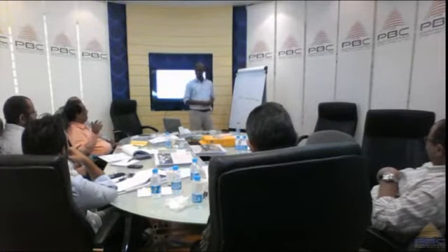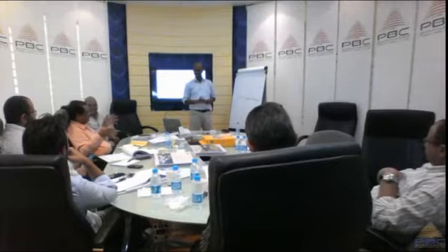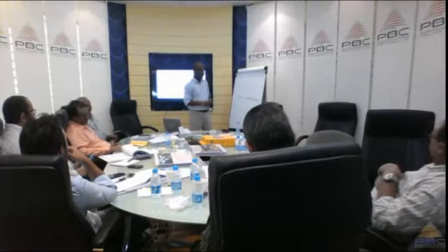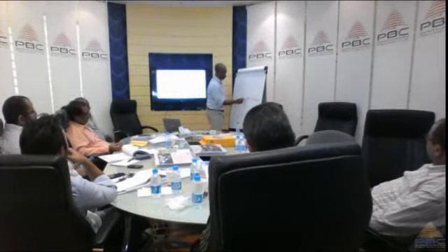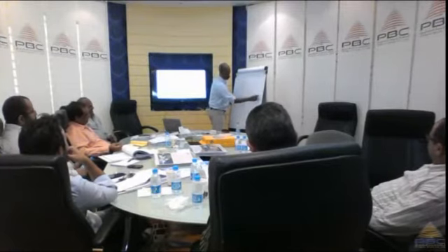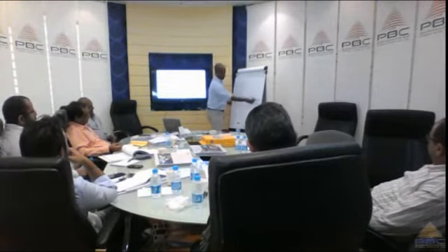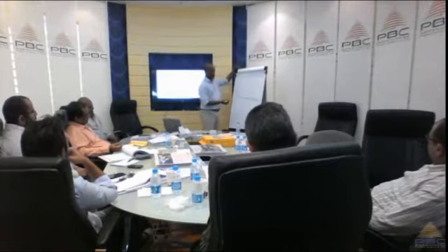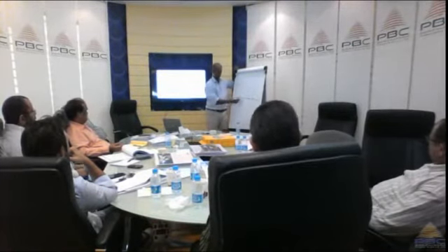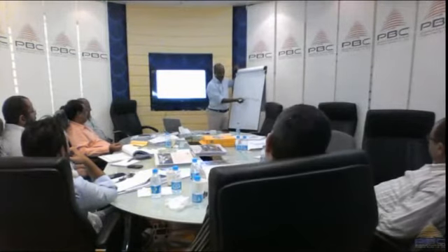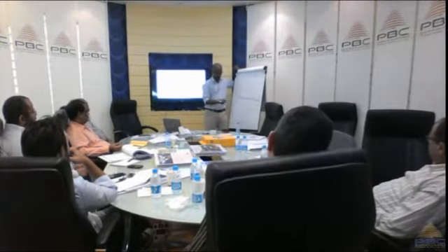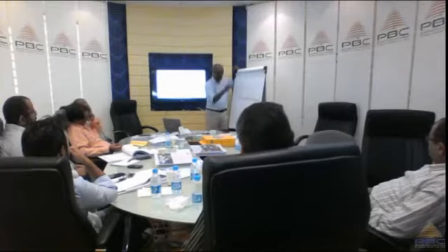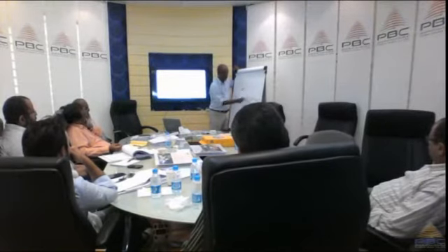Anyway, that's what we're doing. So 2 months to build one floor that will cost 2.4 million. So your report can be based on floors. If you want to base your reports on cost, you have to work out what's the cost of 1 day, or what's the value of work. Maybe you divide by 60 or whatever.